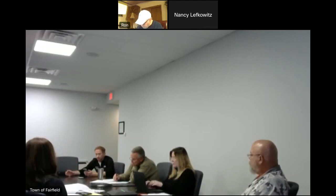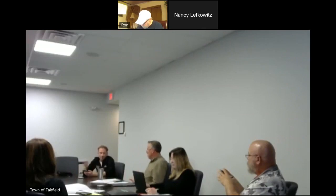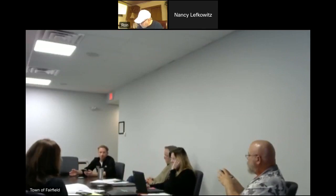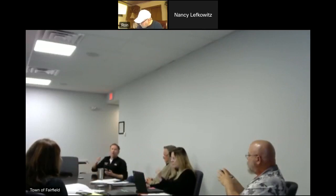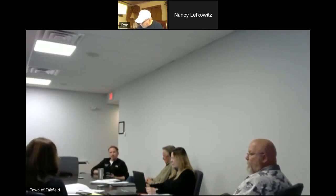If down the line we negotiate a contract with them and don't reach an agreed upon price, then we can pick the next candidate. And then Fairfield's done, or we're ready to move on to the next one, whether or not Fairfield's done. We go to that first consultant first. Let's say we get 5 consultants, are they ranked 1 through 5? That's my understanding, yeah.